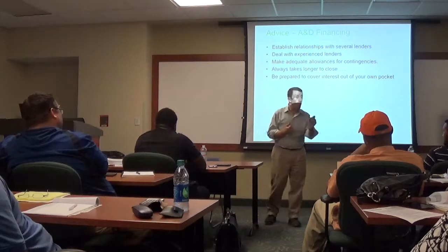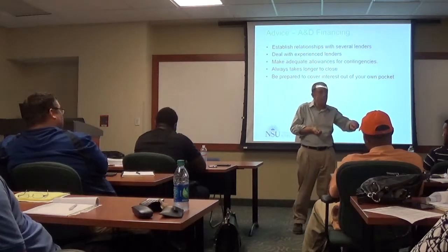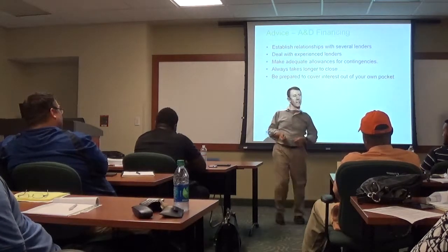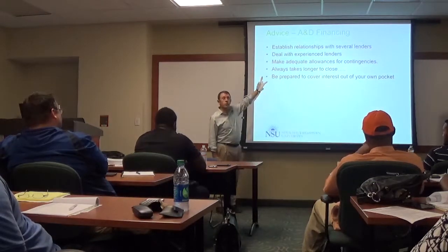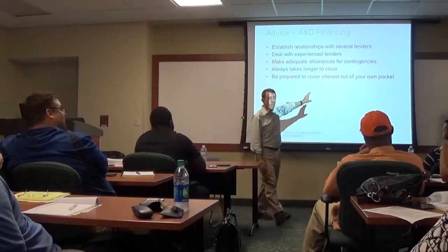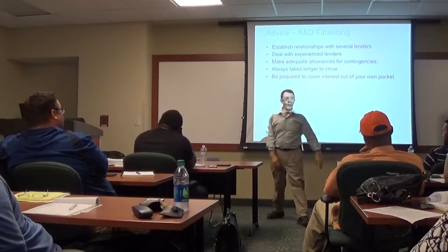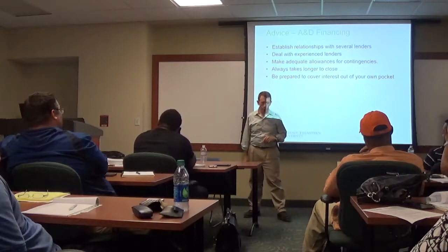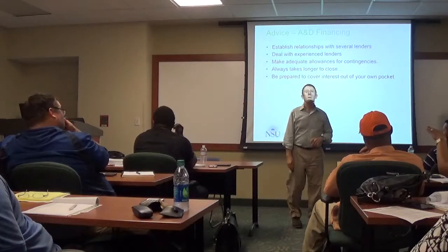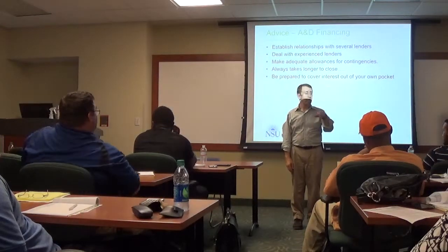And if they approve all those items, they don't always approve all those items, then they'll figure out their loan based on that. And that's where the construction loan comes from. So as a general partner, you have to have the funds to take care of some of those soft costs. And that's separate from the equity that you need to put up as your percentage to go with your limited liability partner? Yes, yes, yes.